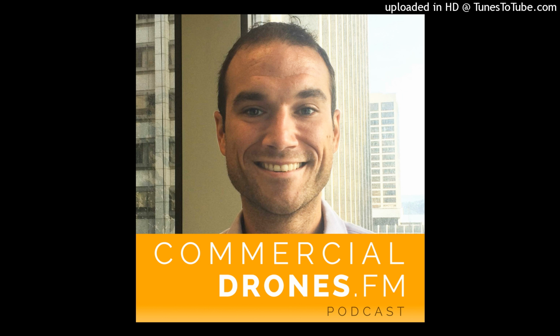And over the past few years I have been interested in drones, and I realized that drones with photogrammetry could provide at least not precision surveying. It didn't need to be precision surveying, but it could provide the opportunity to verify these claims relatively quickly. And then at that point, there was an initiative within the company to start innovating. I had a proposal in the early days of this innovation initiative to do earthworks quantity tracking, and it just kind of went from there. I realized that well, if we got this drone in the sky to do precision surveying, why can't we use it to do LiDAR scanning? And why can't we use it to do material classifications and some of these other uses that we could see on a job site?